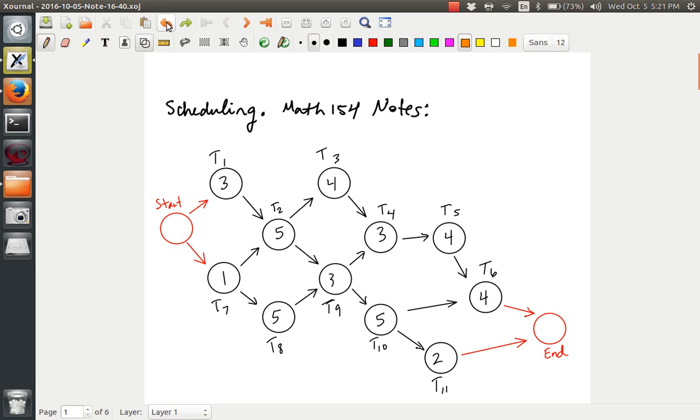So for example, if I just draw this line, say here, I can be pretty sure that either the critical path goes through T3 or through T9. In this case, it can't go through both because it has to choose. Although there may be two critical paths of the same length, and then you could choose. The length of the critical path is unique to every digraph. It's the length, not specifically the path, because you might have more than one critical path of identical length. That's okay.